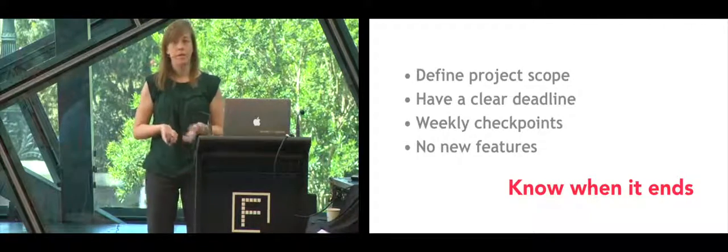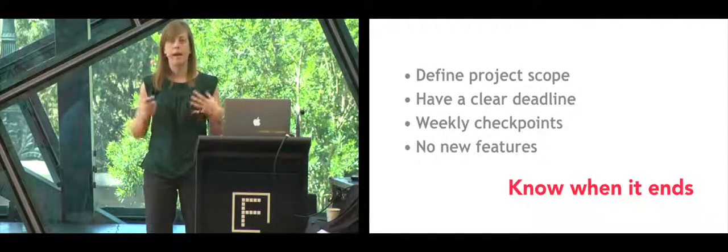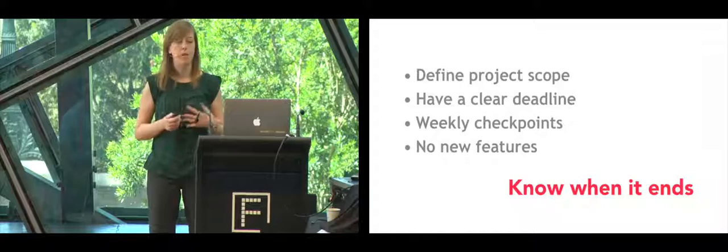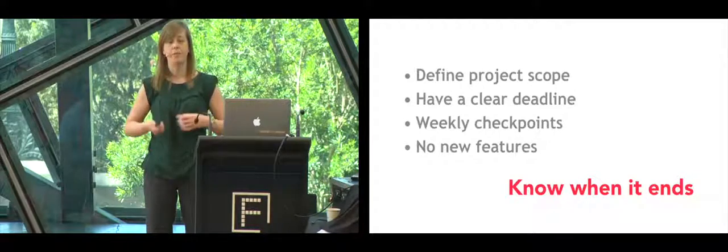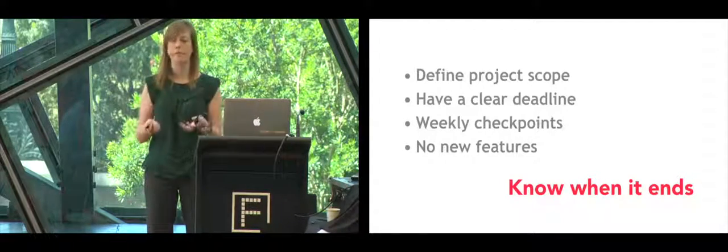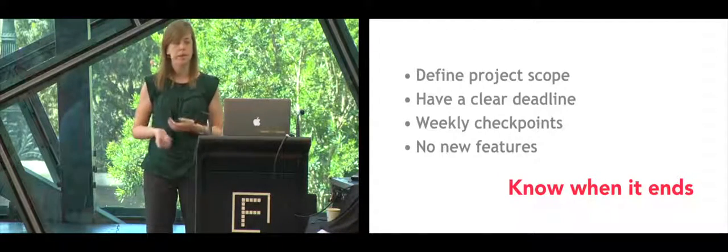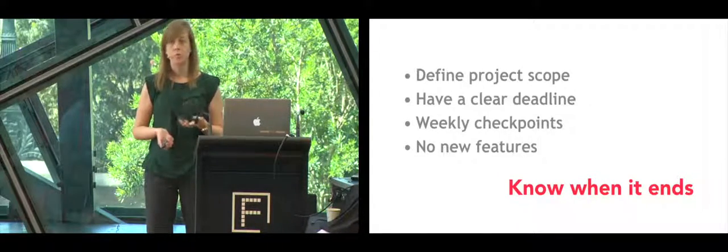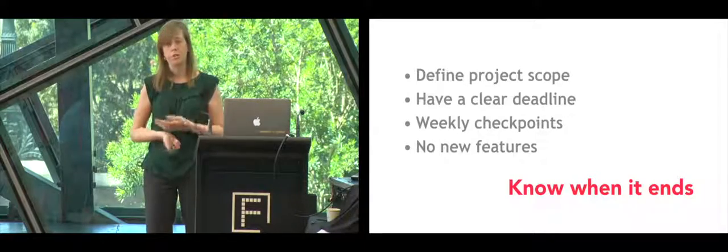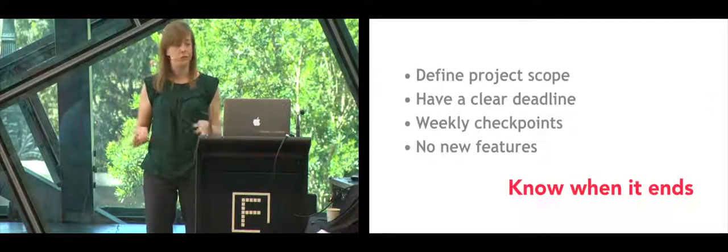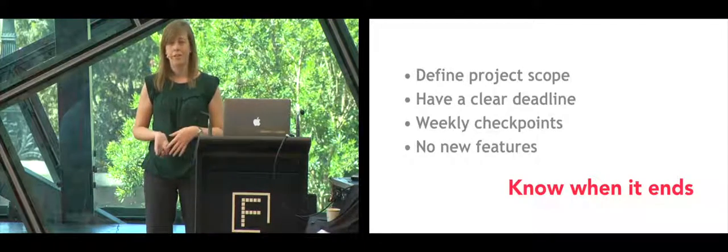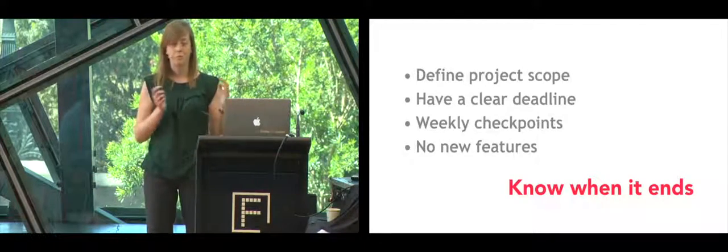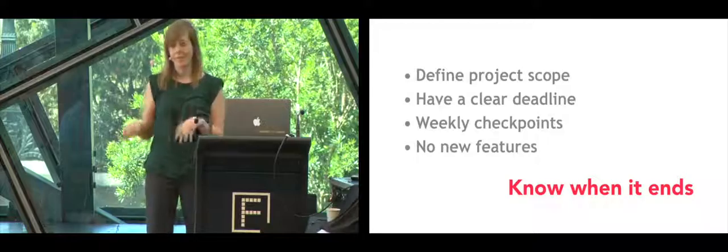And even after we had that, we would reevaluate that deadline every week and check that we were still on schedule. And then we would simplify and delete even more features if we needed. For us, at the time, having a new feature was less valuable than moving fast again. So during that project, we didn't add any new features. Until we finished, it was either rewriting or deleting.